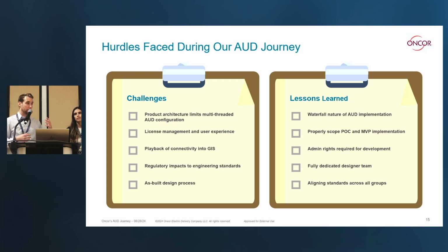So we did an initial pilot of the solution, and while we did gain some knowledge there, I don't think we focused on some of the right things. So we spent a lot of time on that pilot, and we didn't recoup a lot of the investment that we used there because some of the things that we did there just had to be scrapped because it was really for demonstration purposes instead of for long-term use. So making sure that we set clear guidelines for what that pilot needed to be would have helped us either, one, reuse some of that material a little bit more, or number two, maybe we could have sped up that timeline a little bit on the pilot to make sure we didn't spend as much time throughout that process.